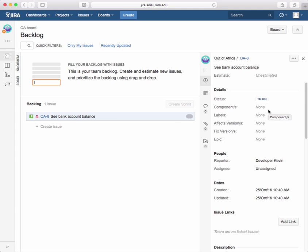Well, another thing that you might want to do is you might want to enter the estimate for the story. Now, how do we estimate user stories? Well, we've learned in our class on agile project management that we are going to be picking estimates that are just scores. And we've learned that the scores are going to come from a number series called the Fibonacci number series.